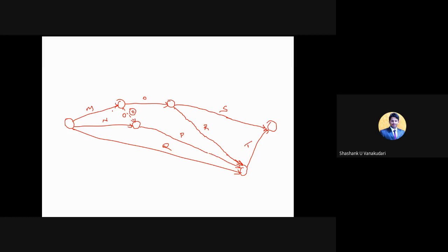So now you can give the numbers: node 1, node 2, node 3, node 4. These node numbers you can give randomly, that is nowhere dependent on the activities here. But when they have given the node numbers, that time you need to arrange the network diagram and activities as per the node numbers.